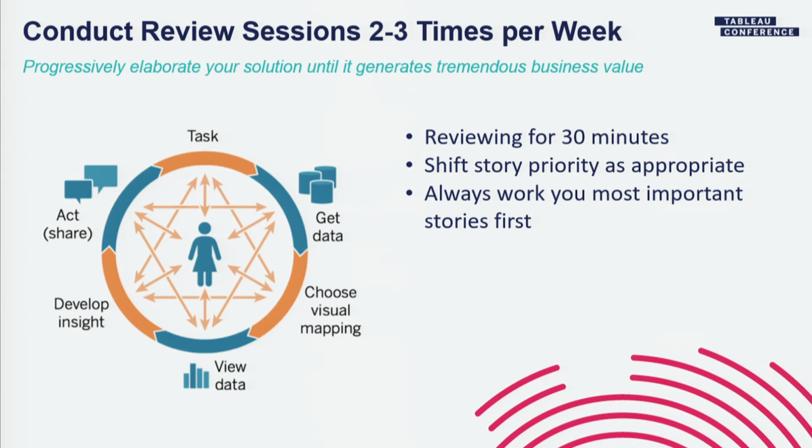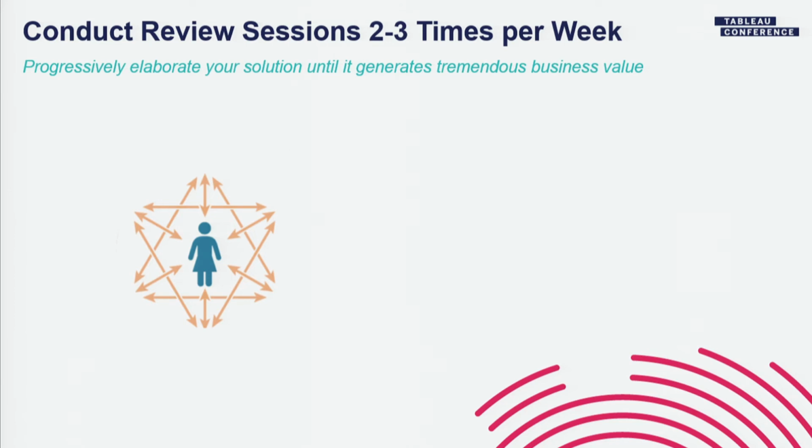Generally, as we recommend, we're trying to get this done in 10 days, so we're going to try and meet 2 to 3 times a week for at least 30 minutes, where we're showing this, getting feedback, and iterating. This part of the cycle can feel overwhelming.